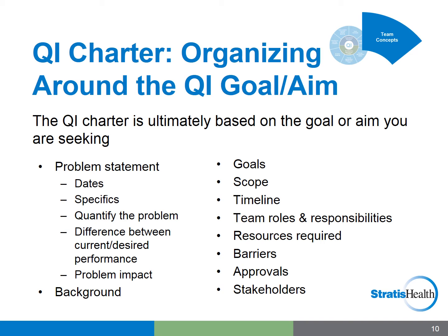charter. Depending on the organizational process and potentially the specifics of a given project, the individual or group responsible for developing the charter may differ. In some cases, charters are developed by leadership teams and then handed off to the QI project team leader. At other times, the QI project leader or the QI project team may develop the charter and then seek approval to move forward from leadership.